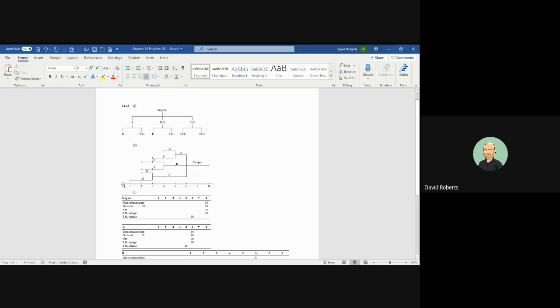So if today is day 0 of the time period, you don't have to do anything. But in week 1, you better start to either make or order some Es. In week 2, you better start to either make or order some Ds and some Es, and you'll see the quantities in the material requirements planning document.